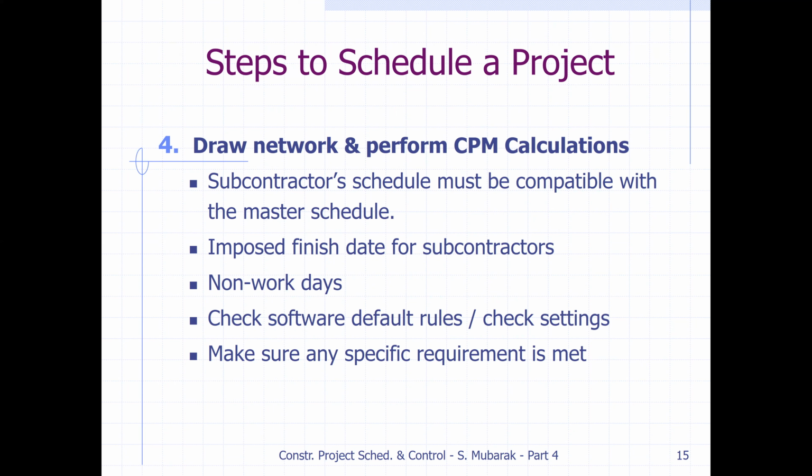We have to decide in the network schedule what the non-work days are. If there are any holidays or national holidays coming, or the weekend, we have to mark those days as non-work days. So check the software default rules and check the settings.